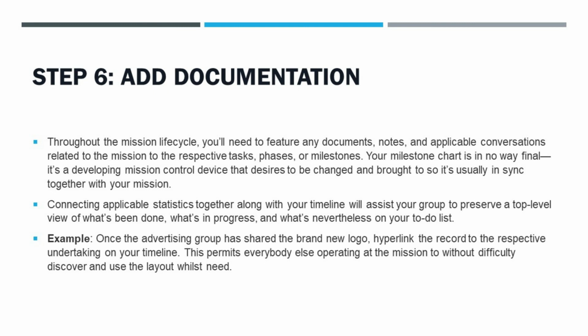Step 6. Add documentation. Throughout the project lifecycle, you'll want to add any documents, notes, and relevant conversations related to the project to the respective tasks, phases, or milestones. Your milestone chart is never final, it's a growing project management tool that needs to be changed and added to so it's always in sync with your project. Connecting relevant information with your timeline will help your team keep a top-level view of what's been done, what's in progress, and what's still on your to-do list.